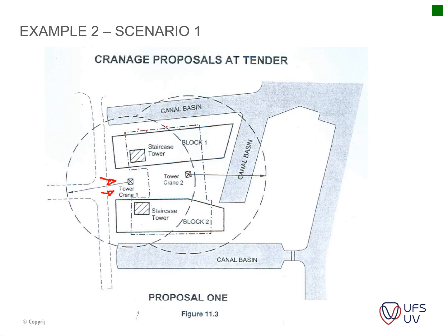Let me just have a look here. Tower crane 1 will be located outside the basement area between the two staircase towers. The 20-meter jib radius will cover all lifting operations for the staircase slip form construction, and will also partly service the construction of the 8-story concrete frames.